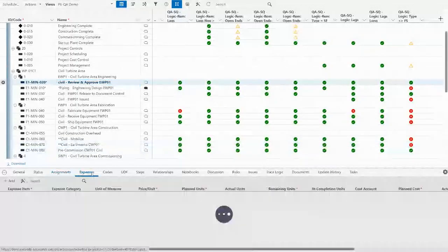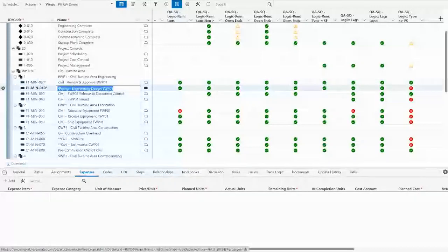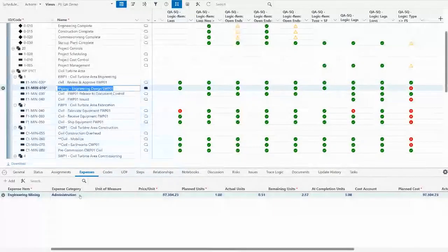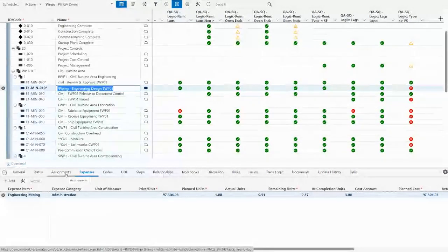The other thing that we have inside of P6 is also expenses. If you're doing some cost management, and probably maybe 30 to 40% of the users do some costing in P6. I would say 100% use it for scheduling, then 70 to 80% use resources, and then lesser numbers use costing. But if you do want to use some costing, you may have expenses as well as resources that contribute to the costing on the project. So we would do that down in the expense window.